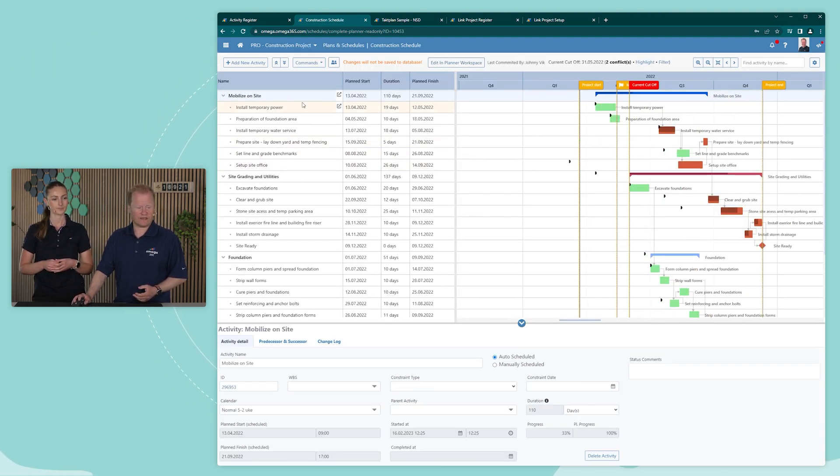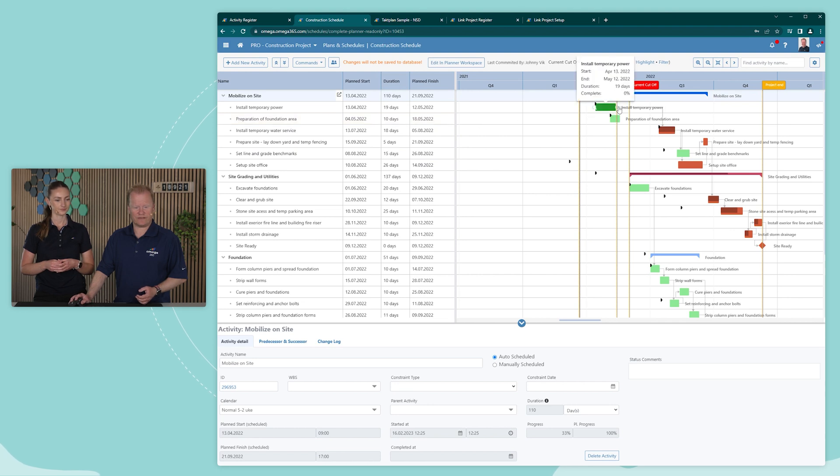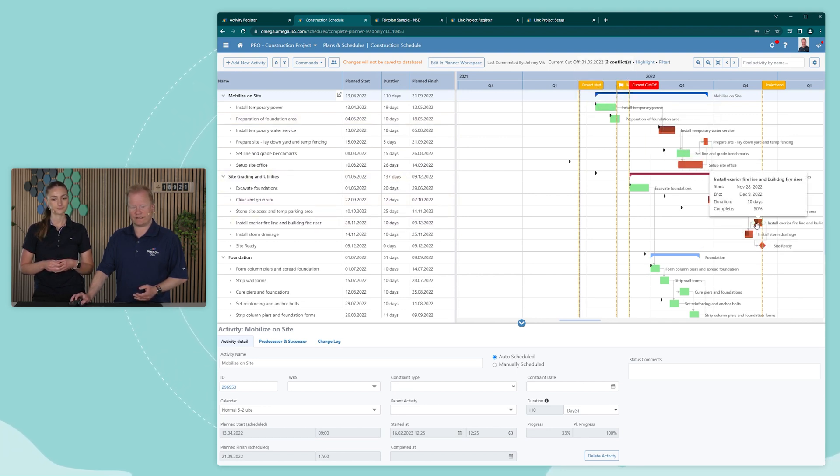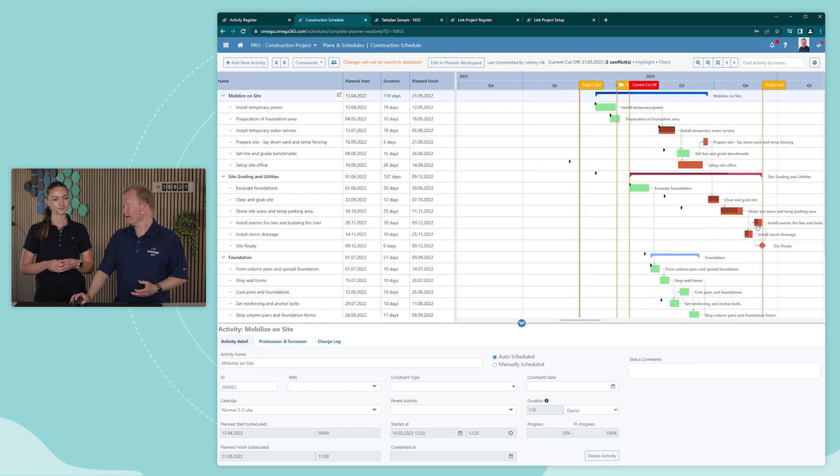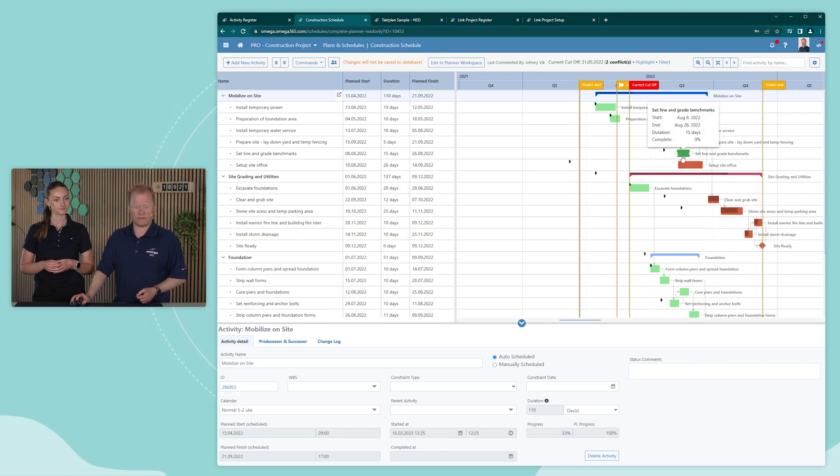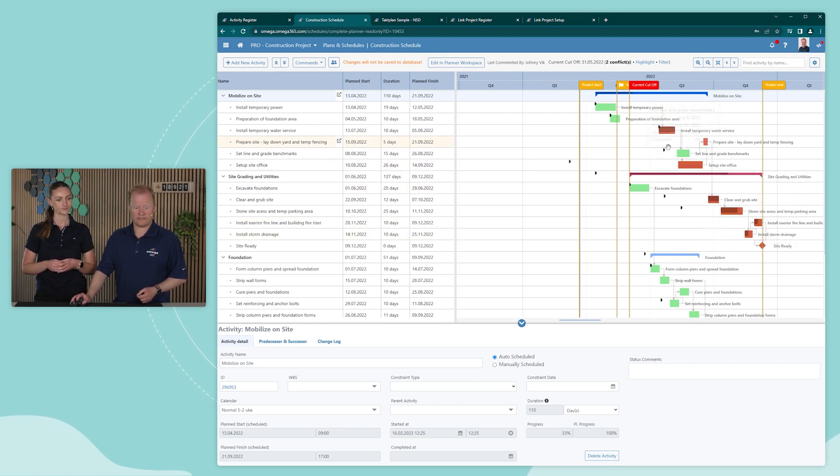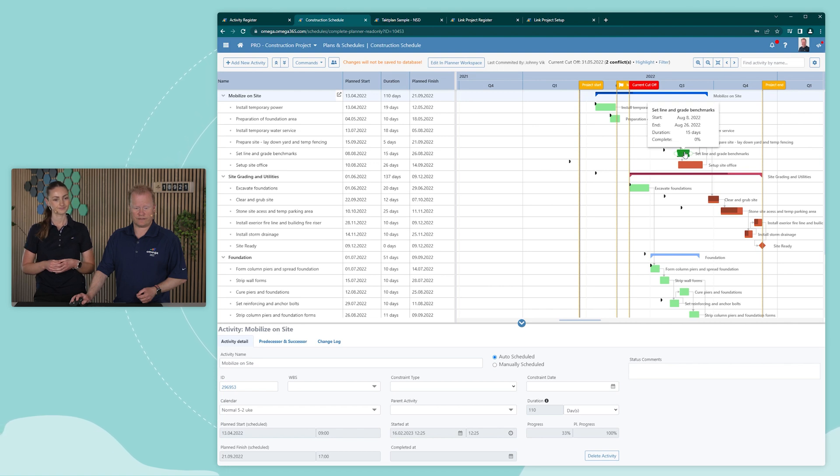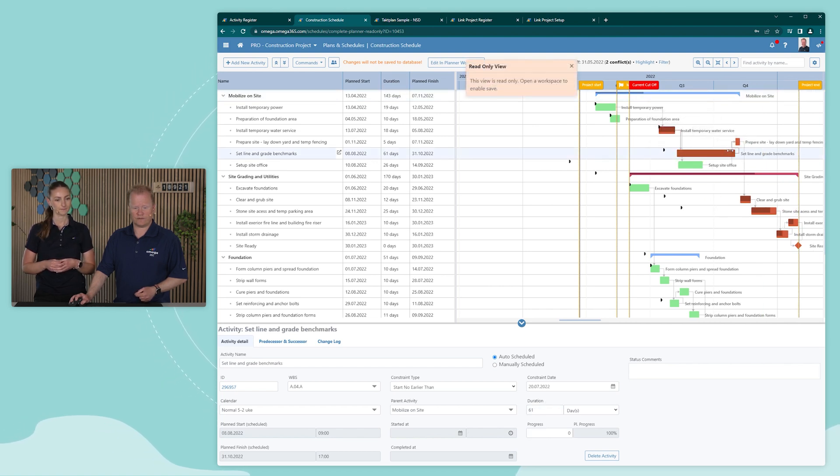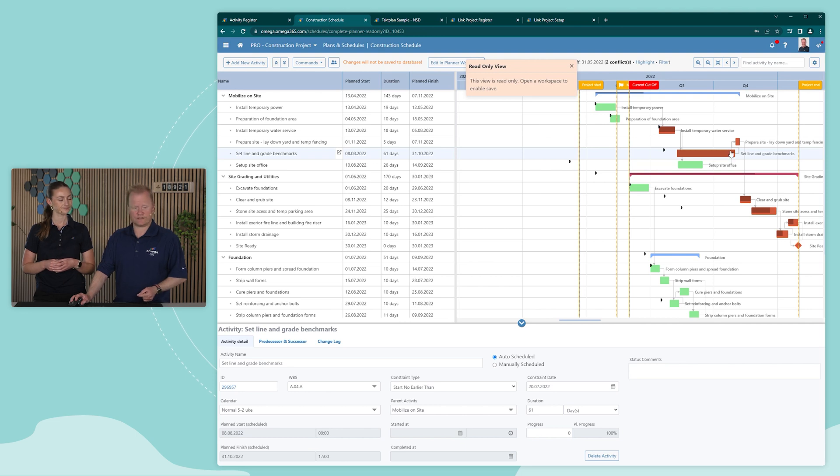As you can see here, we have all different activities. We have different relations between the activities. And those activities that are marked in red are those that are part of the Critical Path. So you can see here if I change the duration of this activity, for example, the critical path now changes.